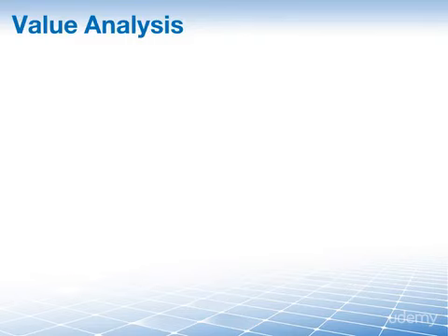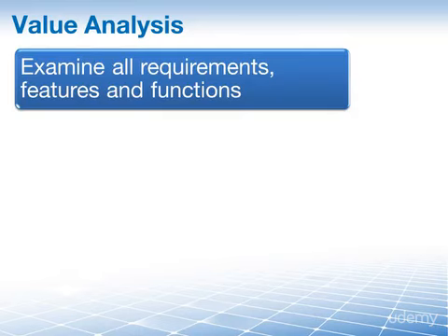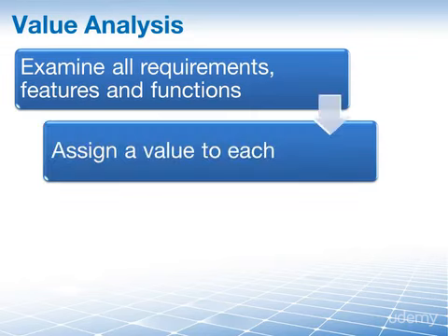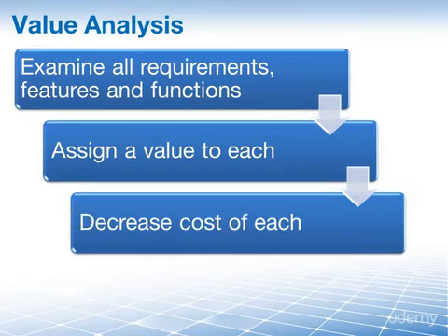Another relatively easy concept to understand is the value analysis. The idea behind the value analysis is to first examine all the requirements, features and functions of your project's final product. The next step is then to assign a value to each of these requirements, features or functions. In your next step, you are now going to try and reduce the cost of each of these, but without reducing your scope.